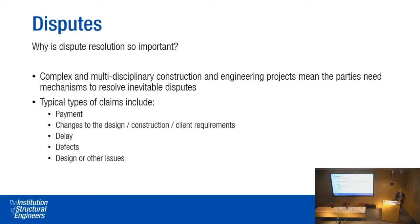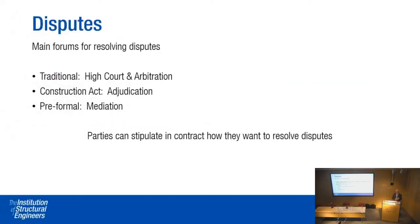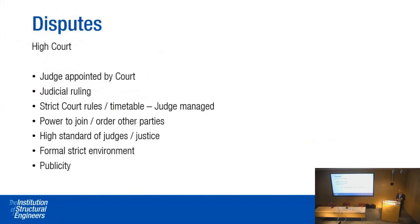Dispute resolution is so important because the industry is complex and involves lots of parties. Claims are not unusual — regarding pay, delay, changes in design, alleged errors in design, and defects. In the UK, the main forums for resolving disputes are the High Court or arbitration, though arbitration is becoming less popular as it has become as complicated as the High Court. Under the Construction Act you have the right to adjudication, and pre-formally there is the opportunity for mediation. Under contract you can specify what dispute forum you will use, and standard forms will always do that.